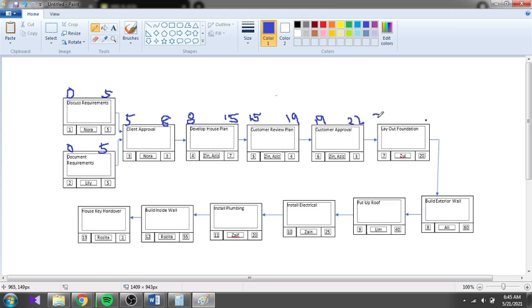22 plus 20, 42. Okay, I still follow this forward ni. 42 plus 60, 102, correct or not? Okay, the problem is if you have a corner like this one, please make sure your consistency: this one is 102 on the left. Plus 40 is 142.